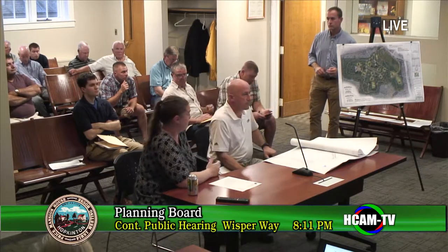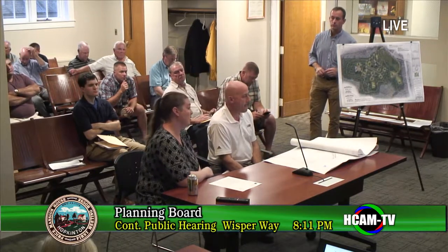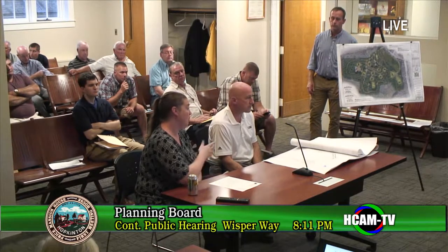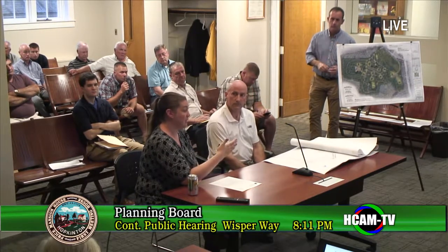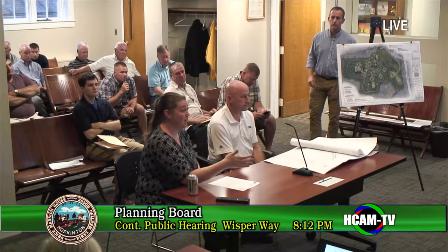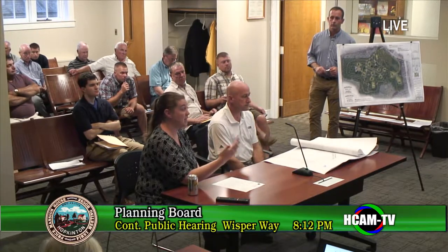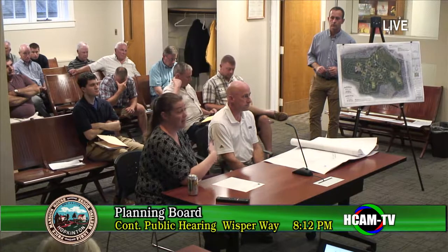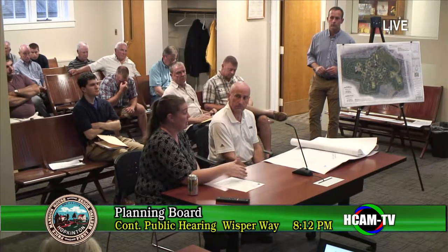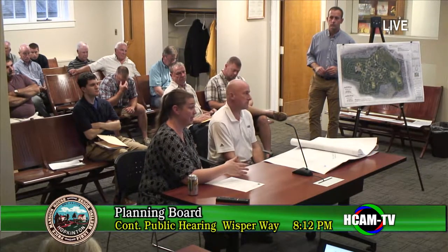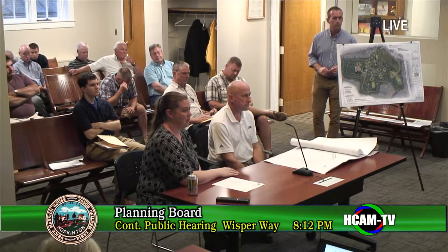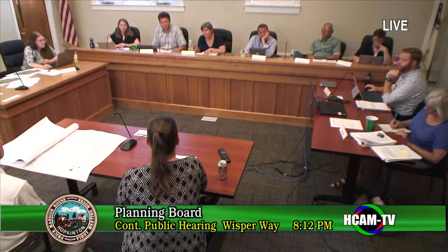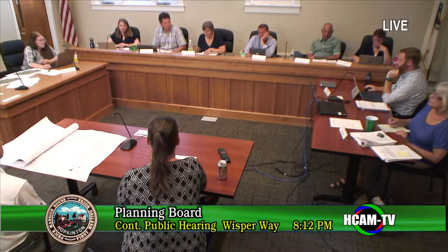I'm not sure. And certainly something that the Conservation Commission, we would probably end up using the matting one way or the other, because in order to get our certificate of compliance from the Conservation Commission, we're going to have to stabilize these slopes. If they're not stabilized, the Conservation Commission isn't going to grant us a certificate of compliance. Do you have any objection to specifically using the matting? No.